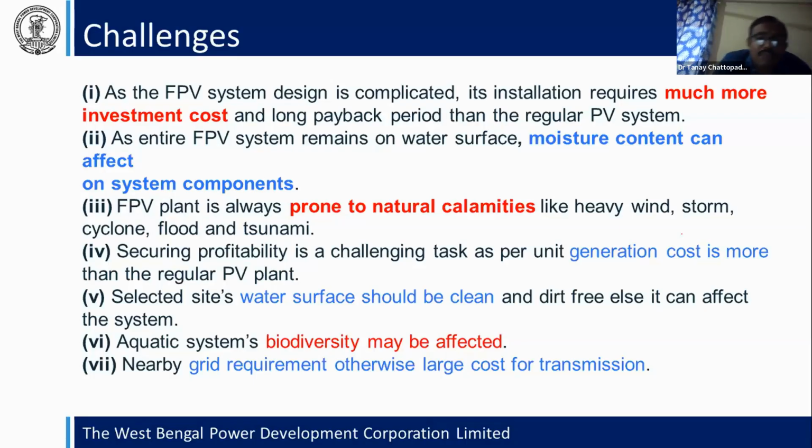If this is required for the biological oxygen demand, the testing and proper monitoring should be required, to see whether the oxygen level of the water decreases after installation of the project. And nearby, water quality checking should be required, such that any contamination of the water by plastic is detected. This should be maintained regularly if the water is used for any drinking purpose or something like that. If it is not for drinking purposes, then you can easily design there.